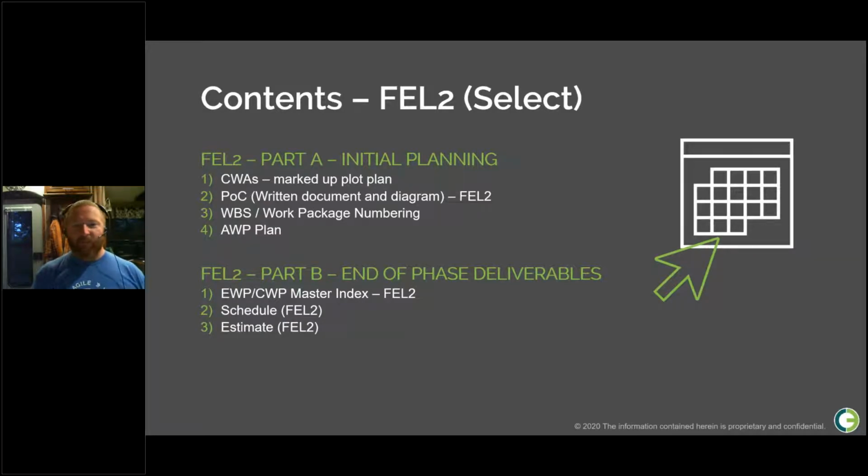Doing anything during FEL2 can seem a little daunting when project information and design progression is at a minimum. This is also the very reason why it's the perfect time to start. Again, there's a popular line: if you're doing AWP a week before construction, it's not AWP. And that's absolutely true. You need to start in the early phases for the whole advanced part of